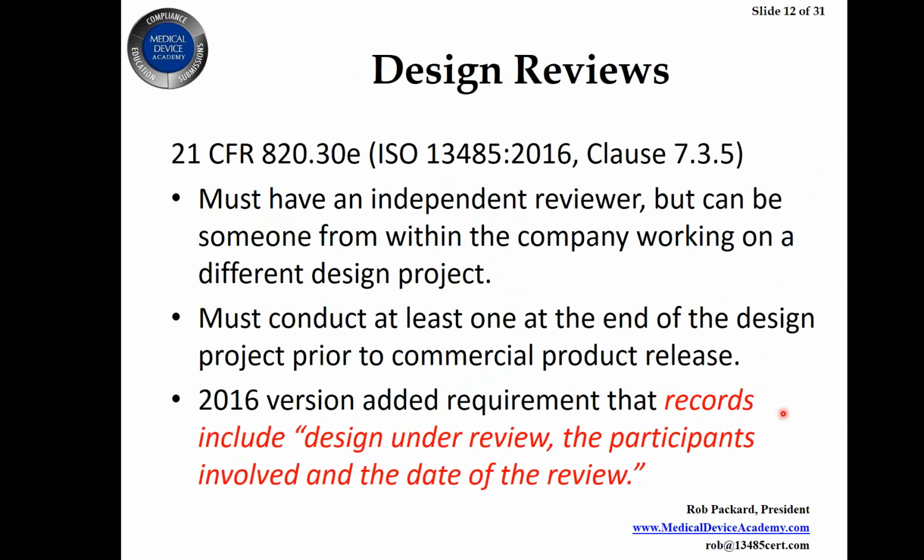Ideally, you'd have multiple design reviews at multiple phases, but if you have a very simple project where you're doing a device modification and you're not changing any of your inputs, you're only changing an output and revalidating, that would be a good case for just doing one final design review, and you would indicate that in your plan.